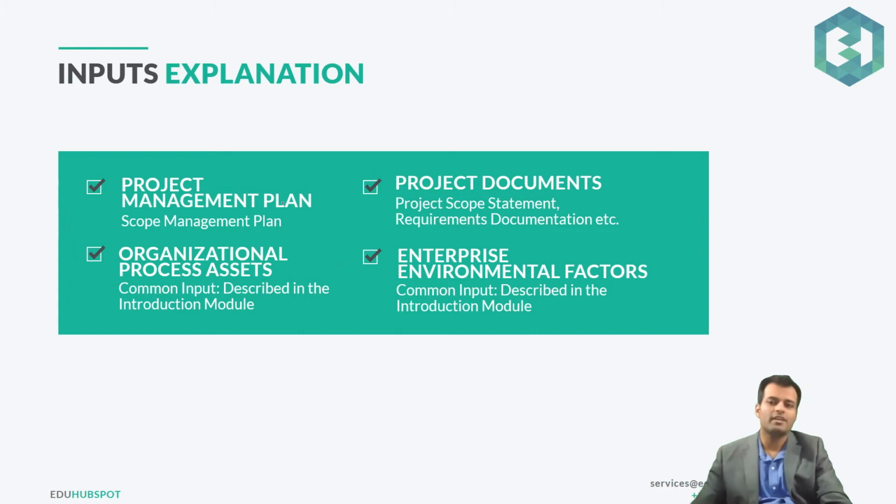So let's see, on the input side, we have the scope management plan, which will tell me how the WBS should be created. So the plan, how this should be done, is part of the scope management plan, and only then can I go into detail and talk about the WBS and develop the WBS.